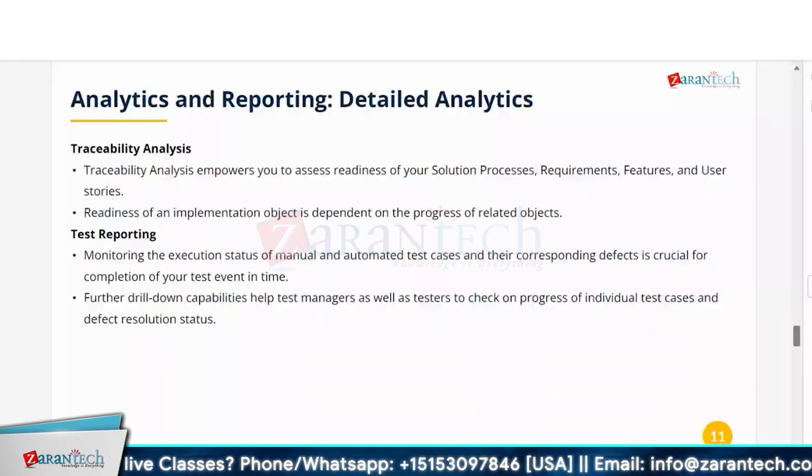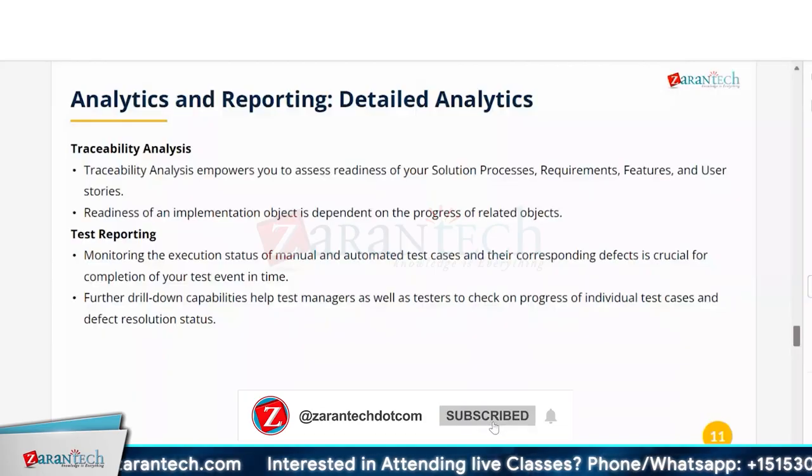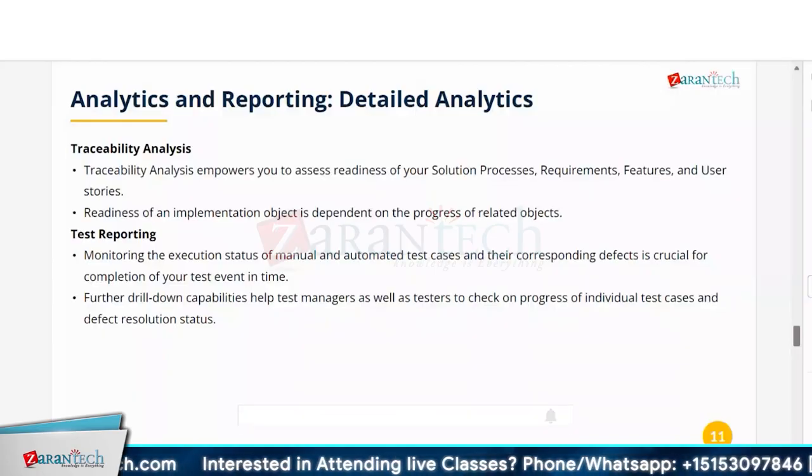When you start a project, even for transports, we have a naming convention. The transport should be named in such a way that it is easily understandable: for which project, for which module, for which submodule, or whether it is for a defect, a new configuration, or a change. So you have a naming convention, like the first two letters define the module, then maybe the wave, or if you're using release or sprint, whatever it could be. Wave 1, W1 underscore S2 for sprint 2.